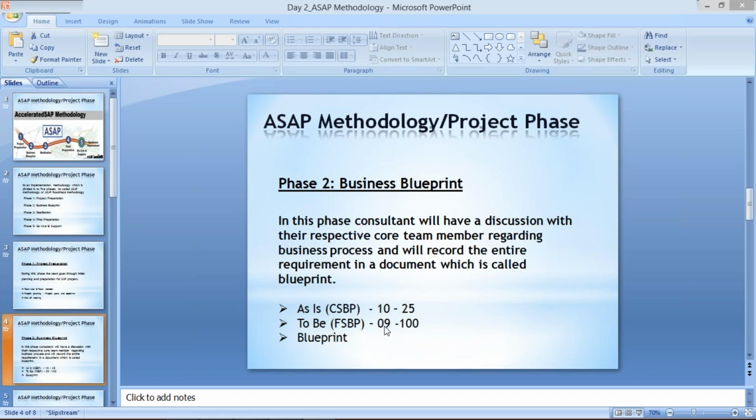That also we are going to specify, the total deliverables and non-deliverables, so that in future they cannot blame us that verbally you gave your consent on certain activities. So the process or the things which we are going to deliver, we specify those, and even non-deliverables we specify here, because the final document is the blueprint.